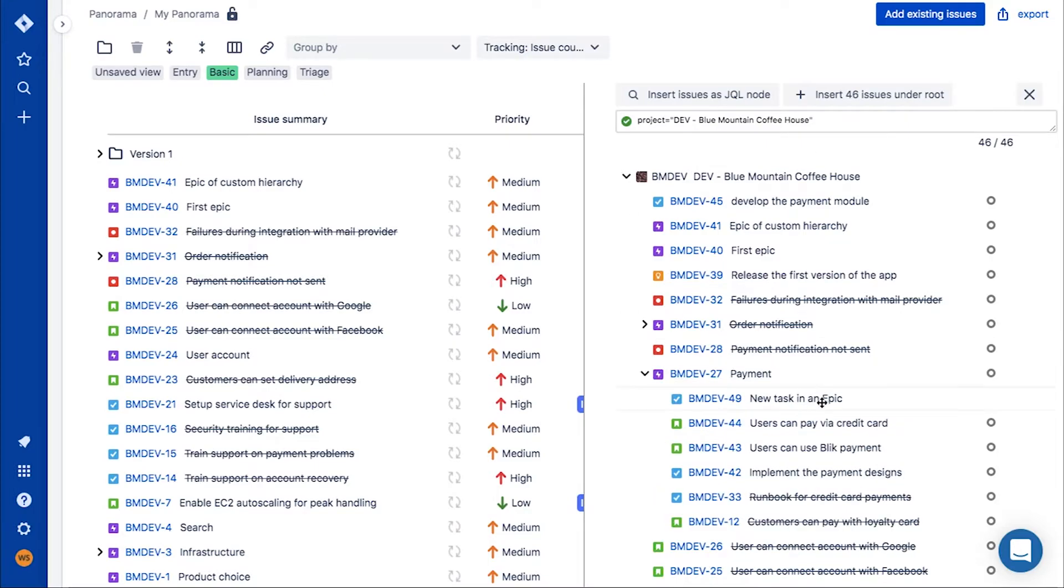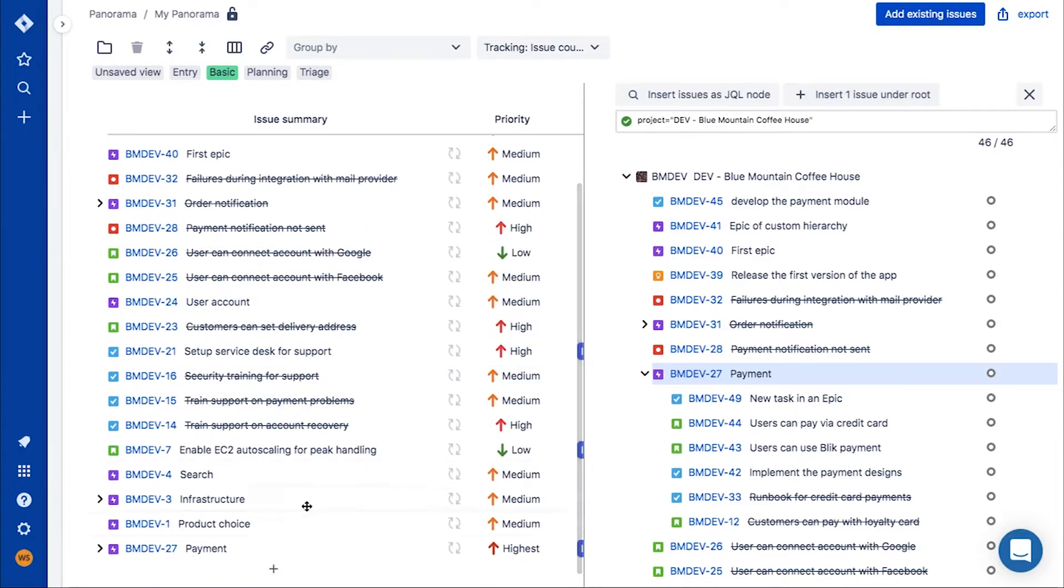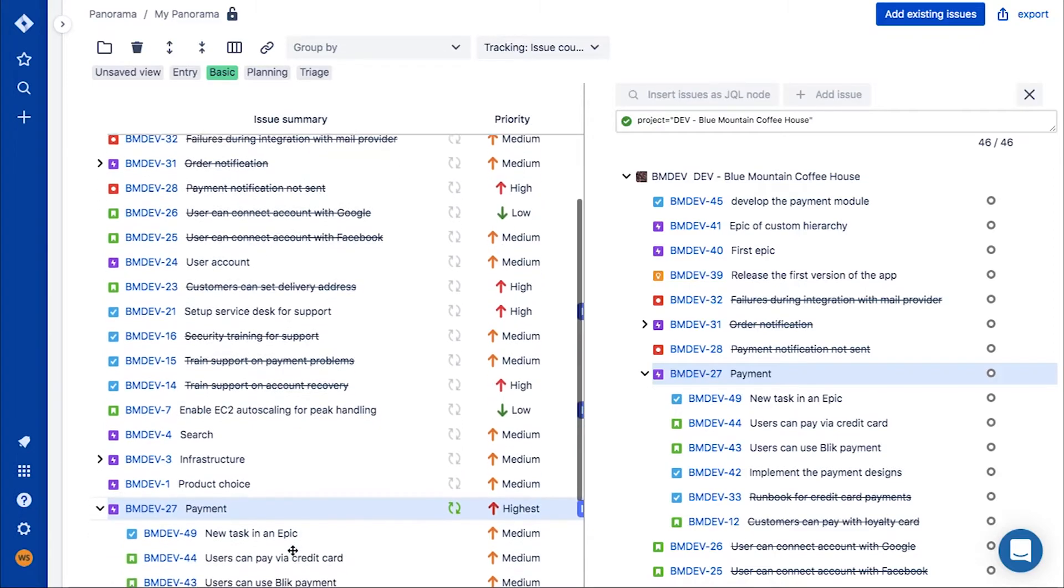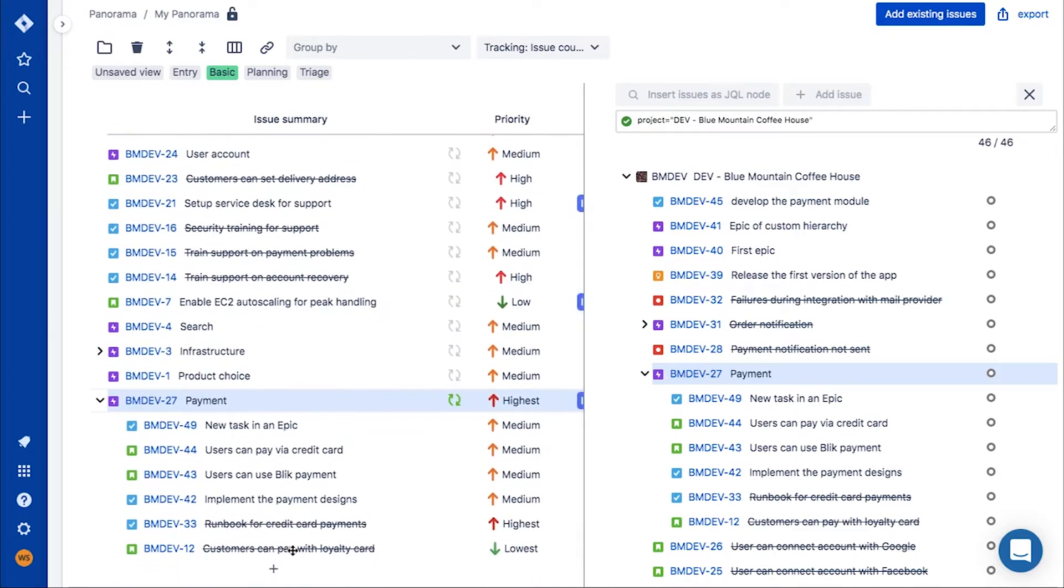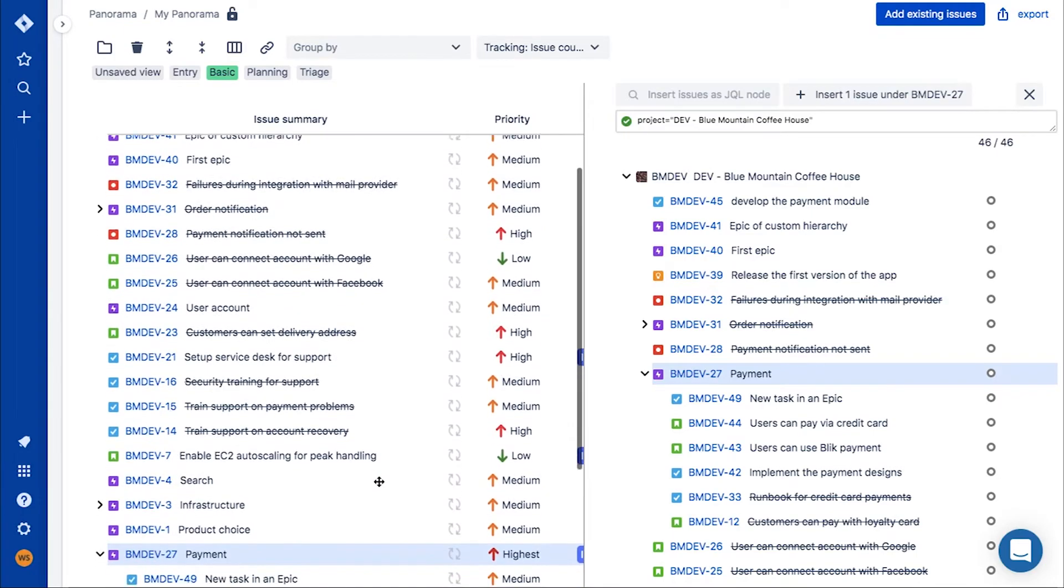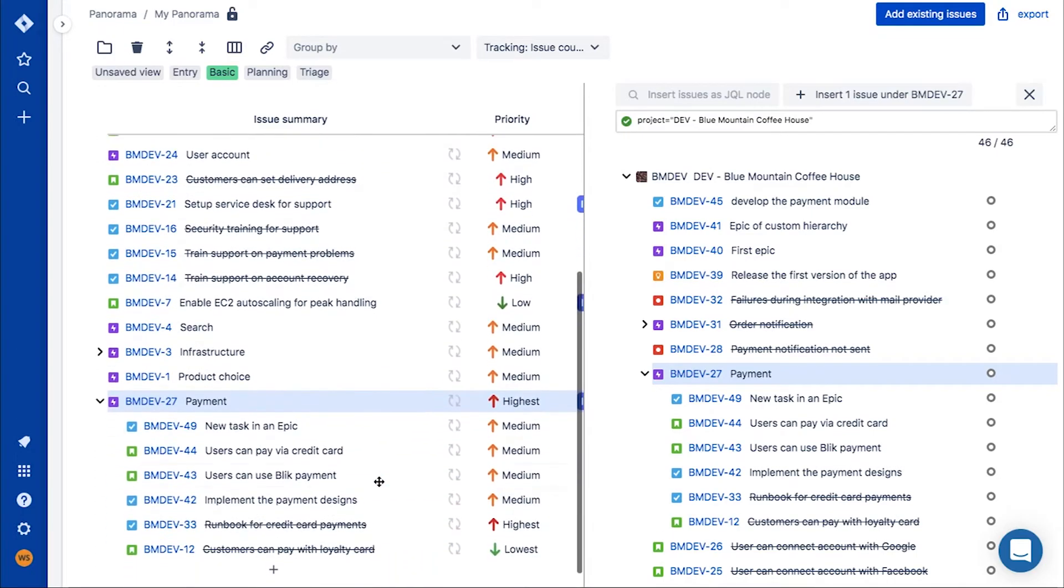Option number two: you can sync the parent issue or a whole folder and the synchronization works both ways. It means that if you add an issue to panorama under a synced item, it will appear in Jira in the right place as well.